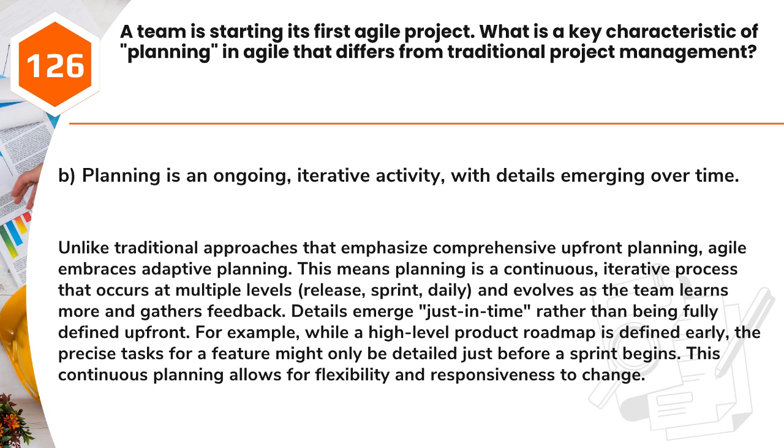For example, while a high-level product roadmap is defined early, the precise tasks for a feature might only be detailed just before a sprint begins. This continuous planning allows for flexibility and responsiveness to change.